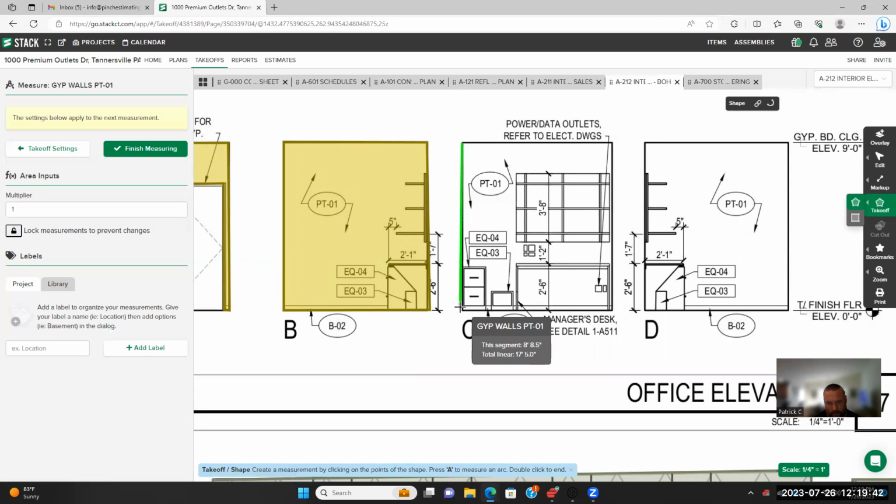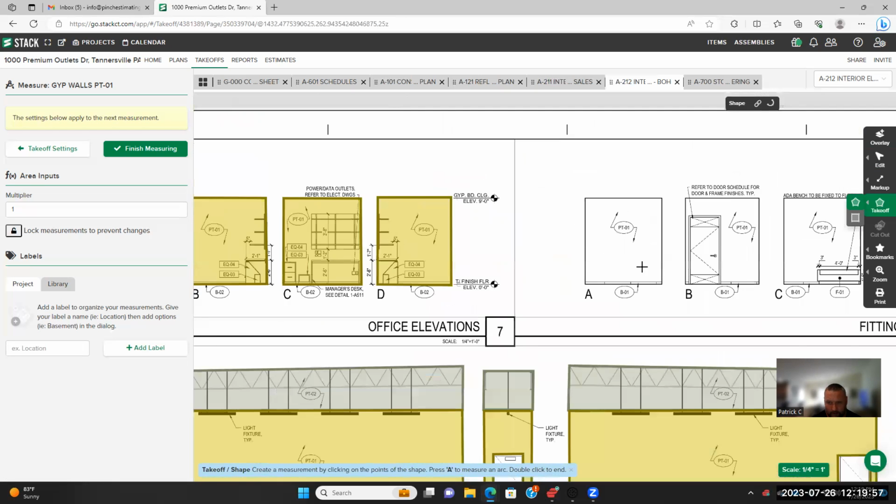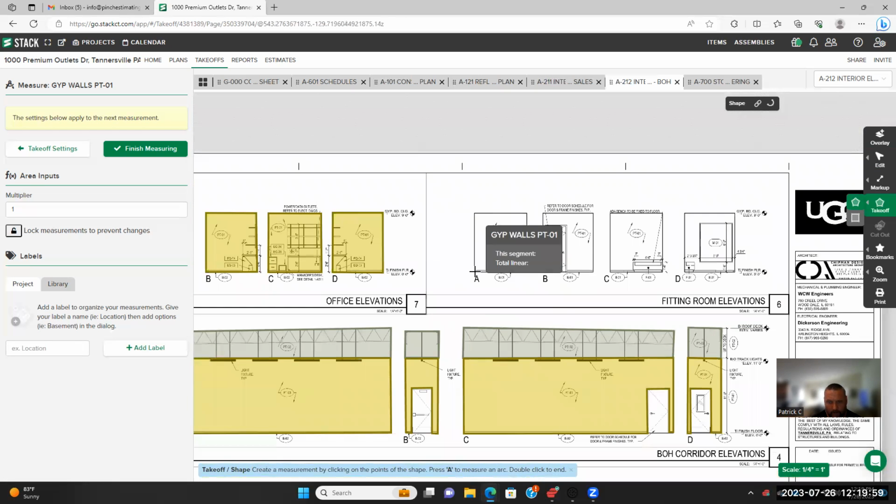Those are things that are going in after the painting. And of course, you're going to have to paint the wall behind that. So don't freak out if you're new to this and you see me doing the takeoff here, but you don't see any, but you see all that stuff in the background. The only thing I'm really going around would be windows and doors.